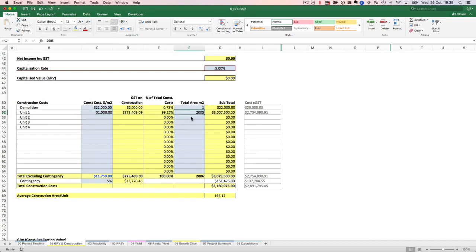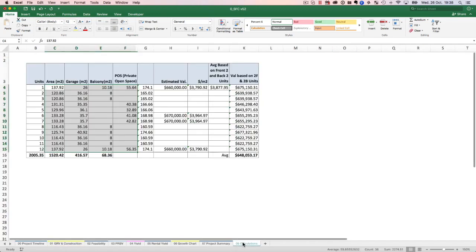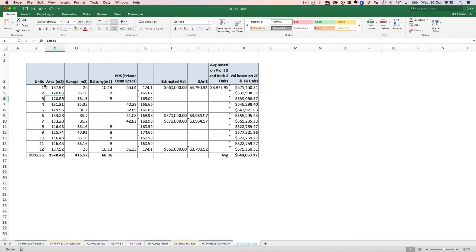You get this number by looking at other people's plans, any site that's got plans and permit. Make sure you find where the legend is, and it is usually on 95% of the architectural drawings. That legend gives you the floor space area for each unit in the plans, and that's how you total it all up.